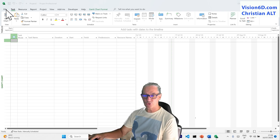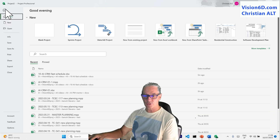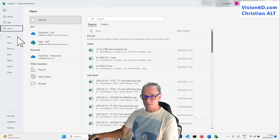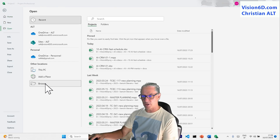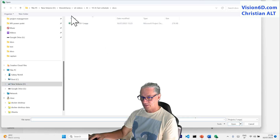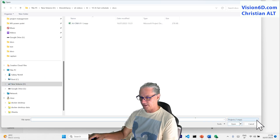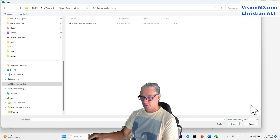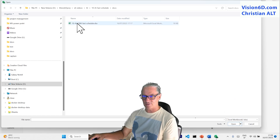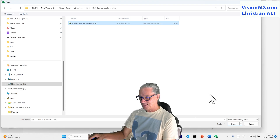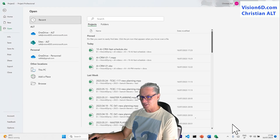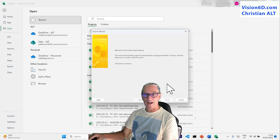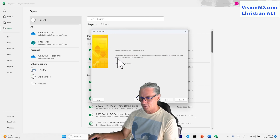I have opened MS Project and what I want to do is import the Excel file. For this, I'm going into Open, I browse. It found already one version of the file I had created previously, but what I'm interested in are Excel files. So I opened the Excel file we created previously, and now I'm going into Open. The wizard opens.